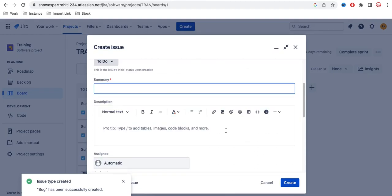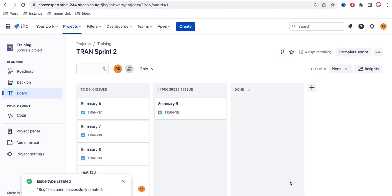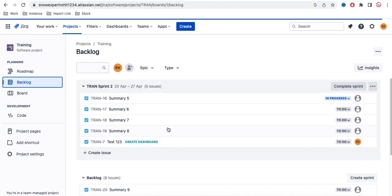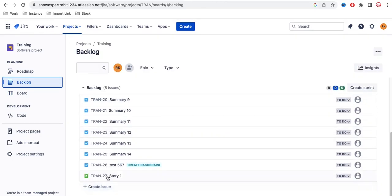I can select Story, put in the story details, and click Create. Let's name it 'Story 1' and create it. Notice that after creating the story, it is not visible on the board — that's because the story is created under the Backlog. You can go to the Backlog and find the story there.